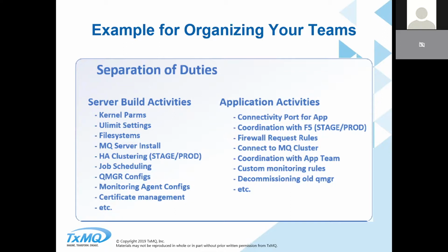And then on the other side, the application activities would involve working with the application teams that are going to be migrated over, any specific firewall requests that need to be done, connecting to an MQ cluster, moving over the MQ objects, establishing security, testing, custom monitoring rules. That would fall on the application team side.